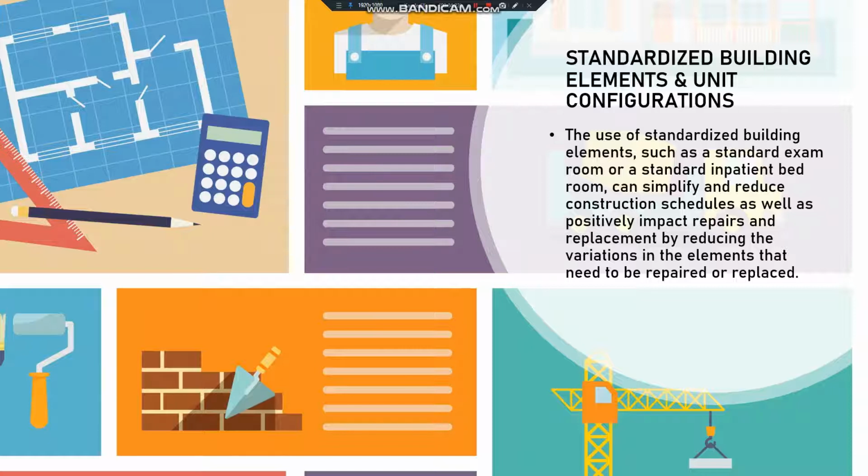Standardized building elements and unit configurations. Using standardized building elements such as a standard exam room or a standard inpatient bedroom can simplify and reduce construction schedules, as well as positively impact repairs and replacement by reducing the variations in the elements that need to be repaired or replaced.